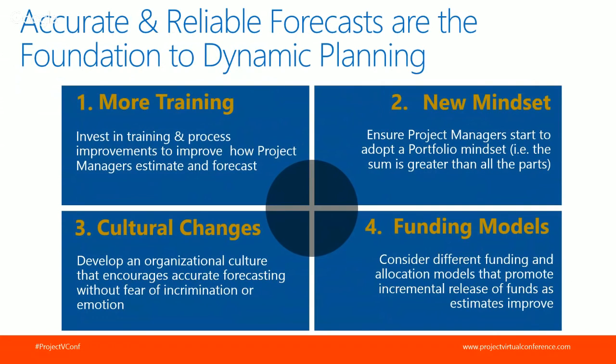Frank LaRocca from Con Edison recalls when he started implementing a dynamic planning framework at Con Edison, he first asked the project managers for the remaining costs on a project, and they all came back to him with simply the budget less actuals to date, and said that's what's remaining. He said, no, I could do that easily in Excel in half the time. I want you to tell me what you think you're going to spend to complete this project.